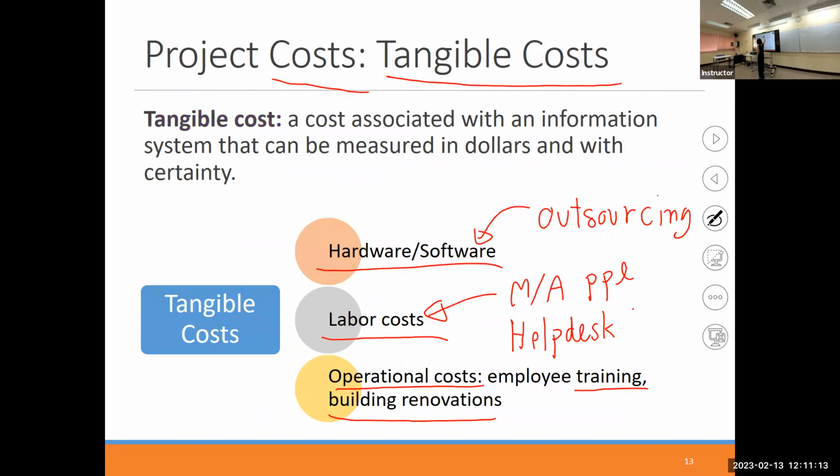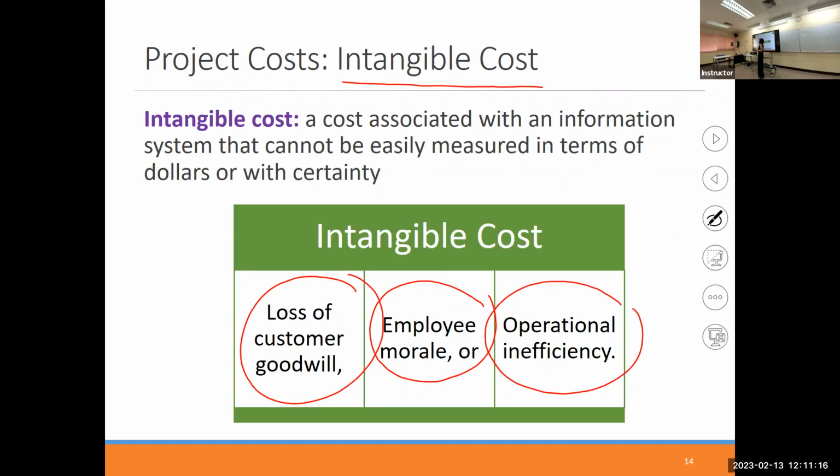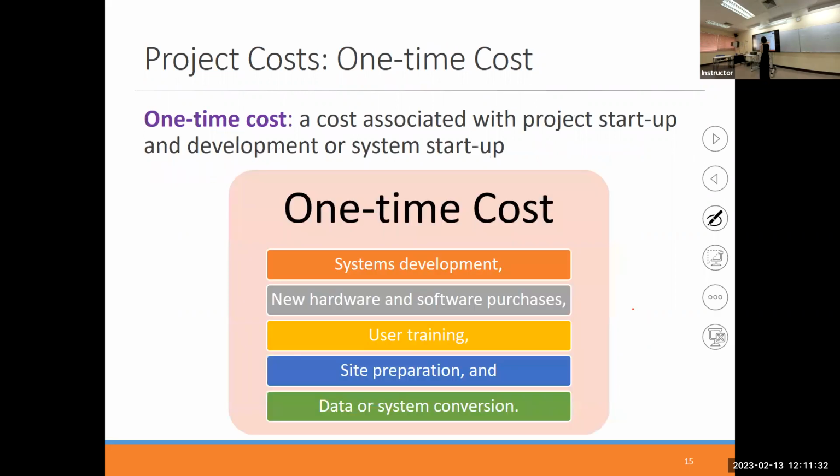And then when we talk about the tangible cost, let me break down further because the cost is very important that you must analyze. So we analyze all the tangible benefits and all the tangible costs in very deep detail when you make a planning, budget planning. For the tangible cost, we can further divide into one-time cost, things that we pay only once to make it happen, and you don't need to continue paying it anymore.